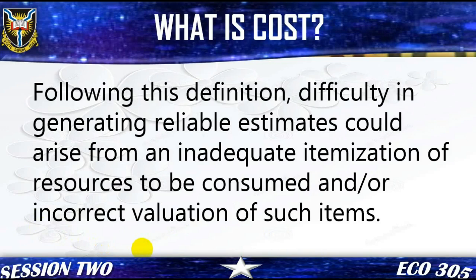Some of the resources are consumed obligatorily. Such items include levies, obsolescence through storage, fire, and theft. The chances of generating a reliable estimate are therefore higher the more detailed the breakdown.